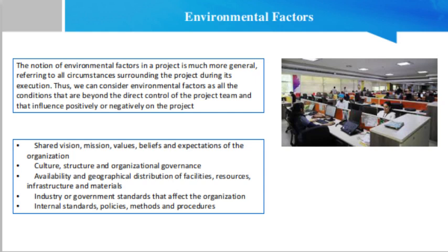In addition, the environmental factors of a project can be classified as internal and external factors. While internal factors will be stable for each organization independent of the project, external factors are more susceptible to change and require superior analytical attention from the project manager. For example, the location of the project in a country where it has never worked will expose it to an unknown regulatory environment, generating many risks in terms of legal feasibility and the labor framework.